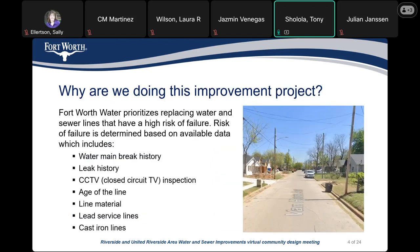Typically we get asked: why are we doing this project? For most of our projects in the water department, we prioritize replacing water and sanitary sewer mains that have a high risk of failure. That risk is determined based on available data including water main break history, leak history, closed-circuit TV of all our lines, the age of the line, the material of the line, lead service lines, and cast iron lines.